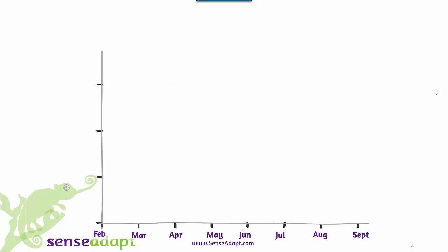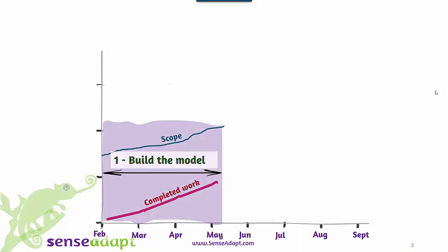So as a brief summary of how this approach works, we take the actual data from your team. Looking over the last few months, we see how it's been completing work, the changes in scope, and we create a model. This model looks at how long each card, for example, took in each column on the board, the number of bugs, blockers, and so on.